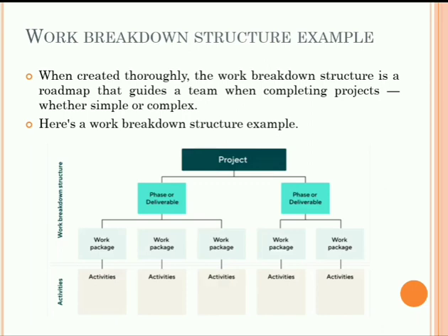Okay, the next step is identifying project phases and control accounts. In this, the next level down is to break the larger project or scope statement into a series of phases that will take it from conception to completion. You can also create control accounts, which are task categories for different work areas you want to keep track of.